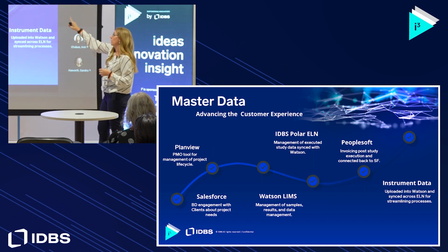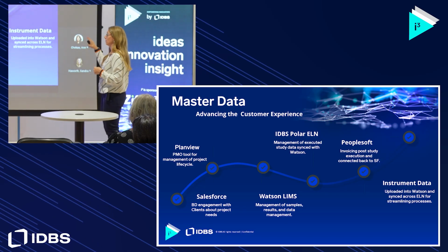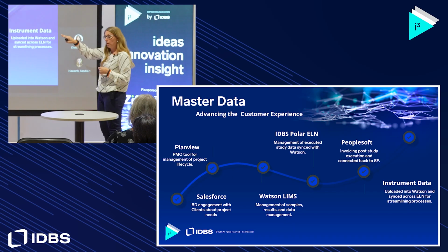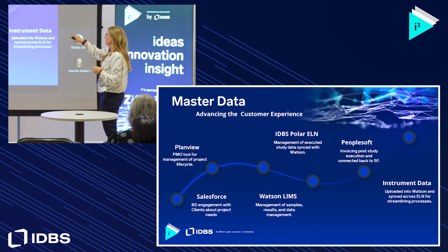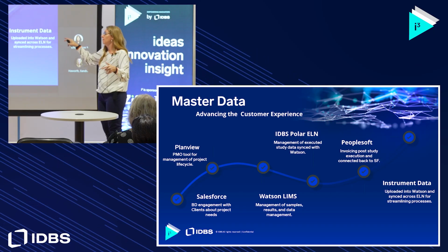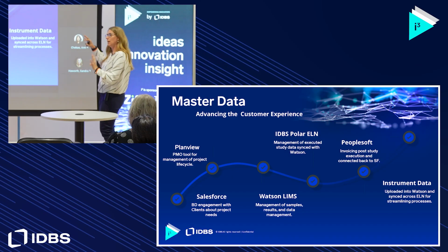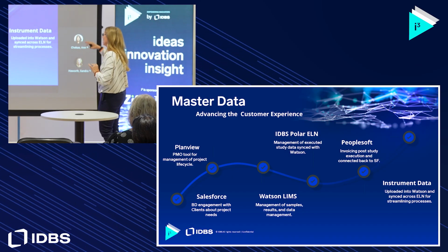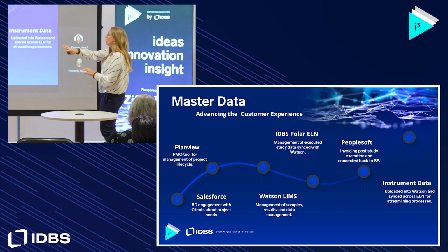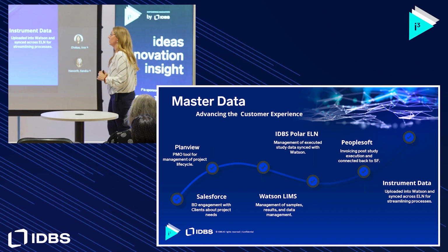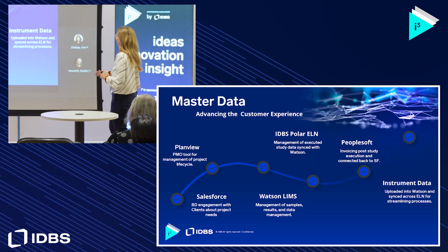But to close the loop on the PlanView side, remember I said we're using the same study number across all these systems. So in PlanView, when the project manager reaches certain milestones of that study, PeopleSoft is automatically triggered to invoice our clients, again all using that same study number. And then the instrument data, that's one of our last pieces we're still working on: an automatic upload of all of our instrument data into Watson. So we have almost everything across this master data flow automated. And it's pretty exciting to actually get here after 3.5 years.